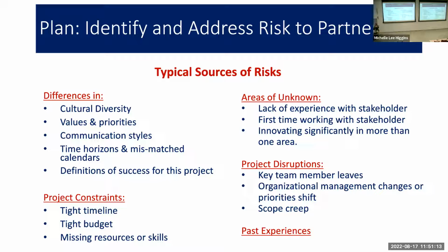Is it our first time and we're trying something? And then are we innovating significantly in more than one area? Like, is it all a huge experience? Are we innovating in our research, but we also have new partners and we have new communication lines? Is it all new, right? That could be a source of risk.